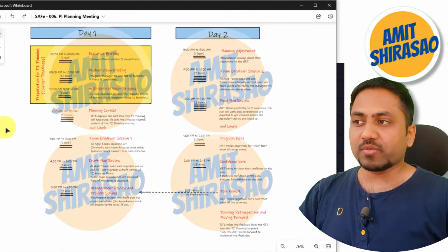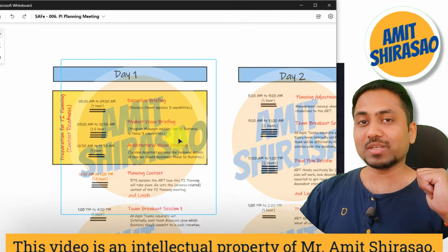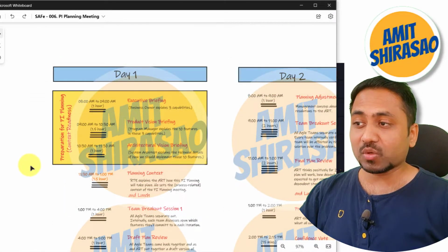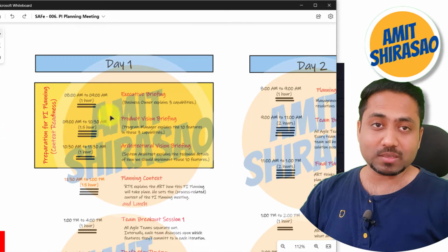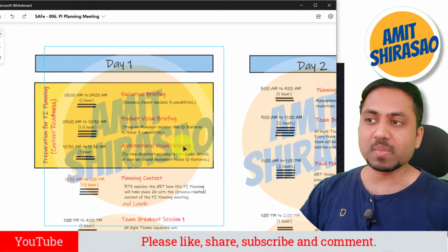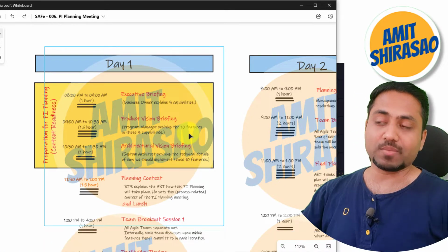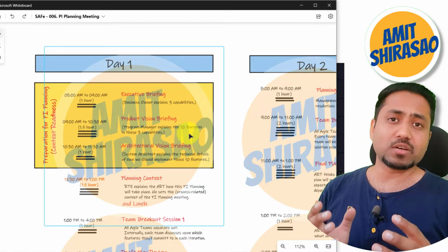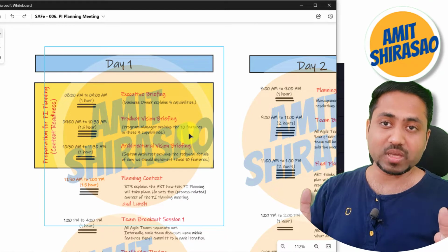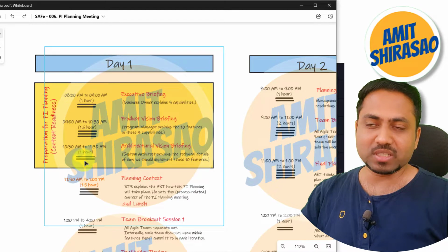Your day 1 starts with the 3 briefings that we also talked about in the last video, if you remember. That is the context readiness. In context readiness, there are these 3 meetings: executive briefing, product vision briefing, and architectural vision briefing. The same thing is going to happen at the beginning of your PI planning. Either you can consider this as a part of PI planning, or as a part of PI planning readiness. Either way, this happens on day 1. This is the first thing that happens.